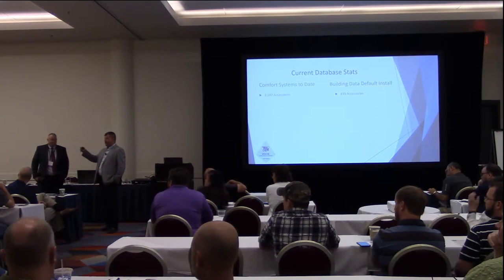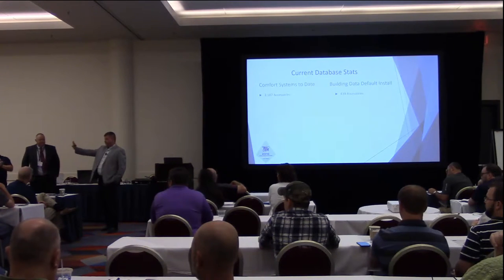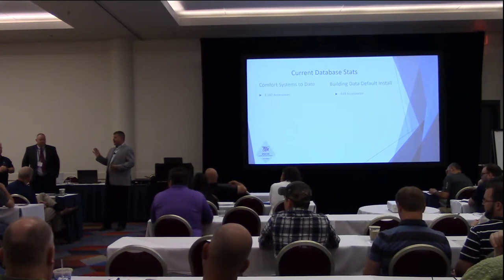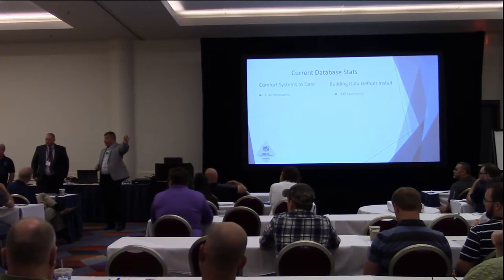Yeah. So we knew there was going to be that transition. Okay, keep using what you got, right? We know that. Finish it out. Some people were just starting, and we tell them, hey, you know what? If you're just starting, you'd be better off redesigning what you have. Take those rev designs out. Let's go to the new database, fill in 3D, and now we're running on a brand new database. Off and running. We did have some of that.